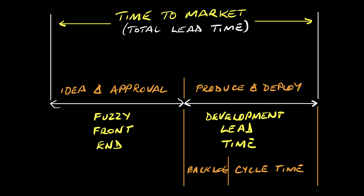The first phase is the time taken from the origin and crystallization of the idea through to approval for production, and the second is the actual production and delivery phase. The challenge with measuring the time taken for all this is in identifying when the idea first emerged. For this reason, the first phase is known as the fuzzy front end.